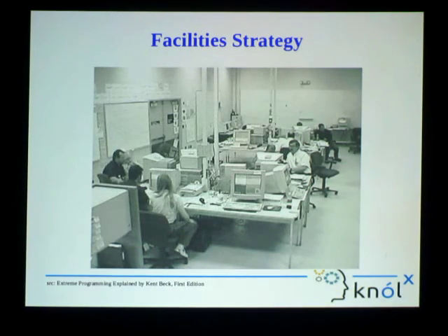Platforms, you can say that. You can't associate any bug with any story. No idea. Basically, there are multiple charts. If we take the example of Pivotal Tracker, there are multiple charts. One is for the velocity that contributes for the story points that we are giving, and it computes the velocity of the sprint depending on the story points that we have covered. Right. So burn down chart is a different story. It's not exactly the same, but it basically works only for the new features that we are taking. It's not considering the bugs. Yeah, exactly. So this burn down chart is just a metric to measure your progress.